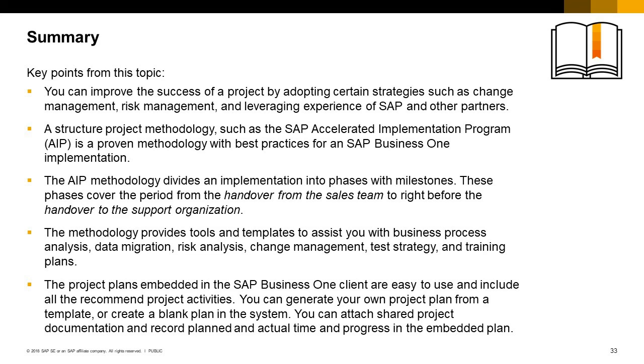The methodology provides best practices, tools, and templates to assist you with business process analysis, data migration, risk analysis, change management, test strategy, and training plans. The project plans embedded in the SAP Business One client are easy to use, include all the recommended project activities, and integrate tasks with the configuration screens. You can generate your own project plan from one of the templates, or create a blank plan in the system. You can attach shared project documentation to the embedded plan, and record planned and actual time and progress.